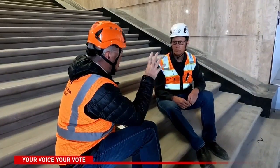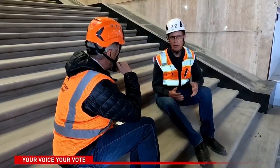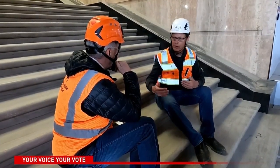Are you able to talk about some of the challenges that you faced in this whole project? Well, any project that goes through multiple stages of construction is challenging, and that's really Josh's department in terms of how to deliver it. But certainly from a design standpoint, we have to think about how people are safe in the building when other parts are being constructed. So we get involved with making sure that there's appropriate exiting and that the separations are there. But really the logistics of construction for multiple phases is the contractor's scope.